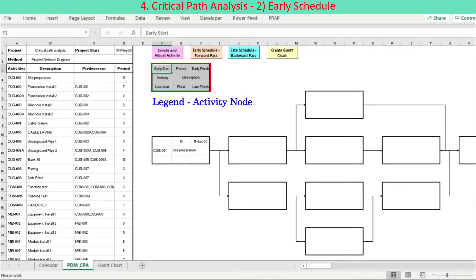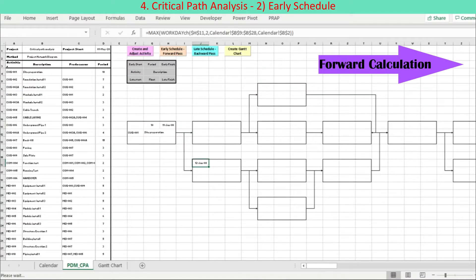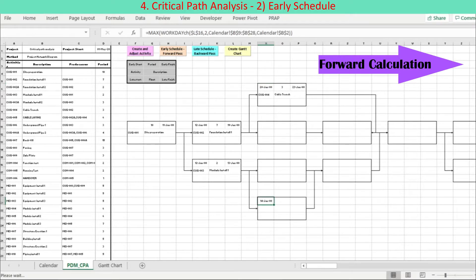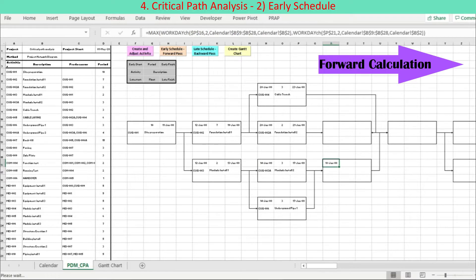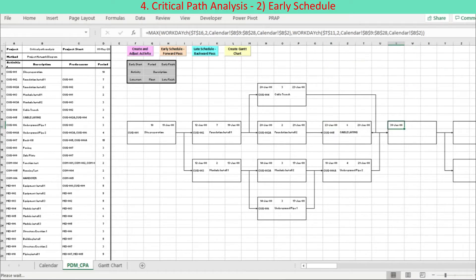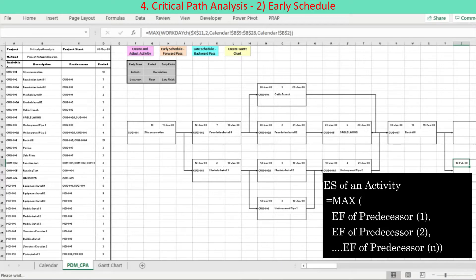The top row is for early start, period, and early finish. The middle row is for activity ID and description. The bottom row is for late start, float, and late finish. Early start, abbreviated ES, is calculated along the forward pass from the project start activity to the project end activity. Activities are allowed to start only after all predecessors are finished; the start date is calculated as the latest, or maximum, finish date of its predecessors. The ES is translated into an Excel formula using the Excel MAX function: ES equals MAX of finish dates of predecessors.